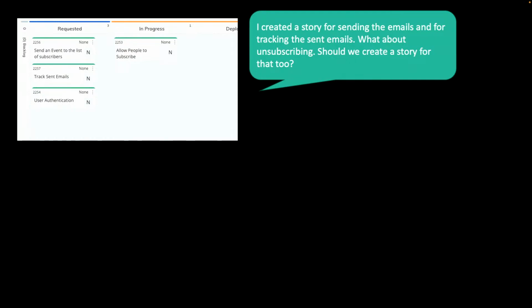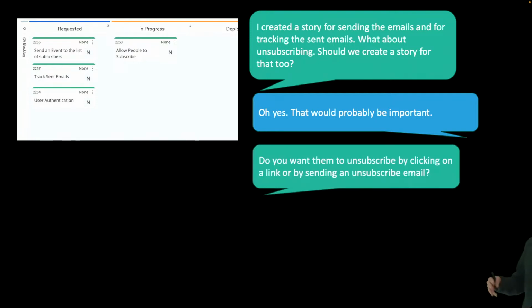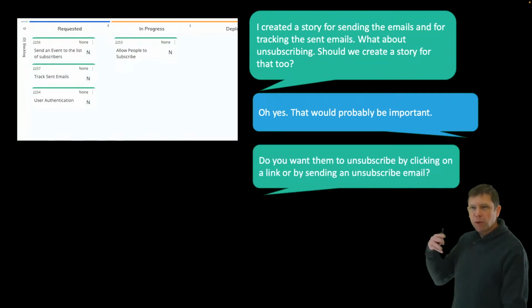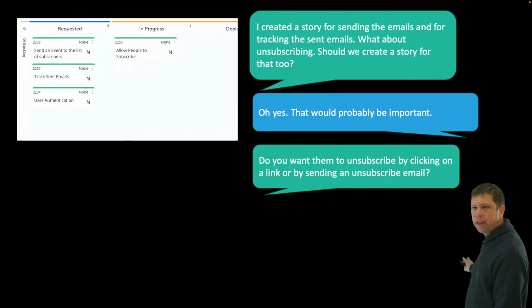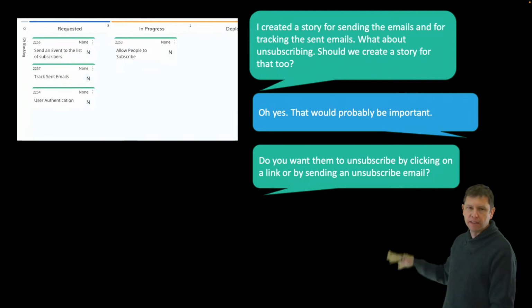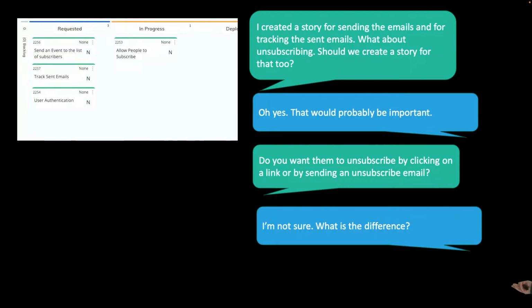What about unsubscribing? Should we create a story for that too? And the customer says, oh yes, that would probably be important. So notice we're capturing things as we think of them, even if we're not going to work on them until later. We're capturing them, and now we can prioritize them against everything else that's going to show up in the list. So the developer asks, do you want them to unsubscribe by clicking on a link or sending an unsubscribe email? Then the customer says, I'm not sure what's the difference.